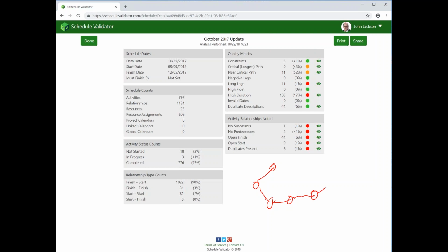But ultimately, they all come down and tie into one node at the end, and through that process, you end up with one path through there that's the longest. But the way that works is if you have one starting, one path going through to that one end activity, then for that calculation to be performed correctly, you need to make sure that it's a kind of closed network.